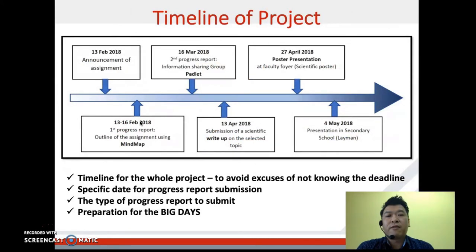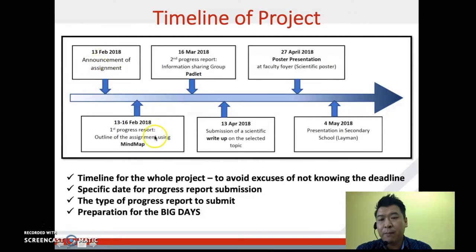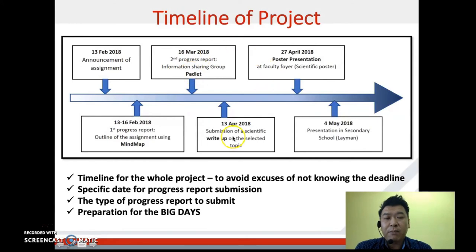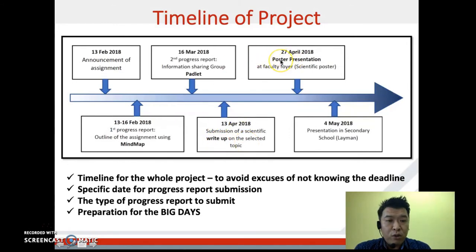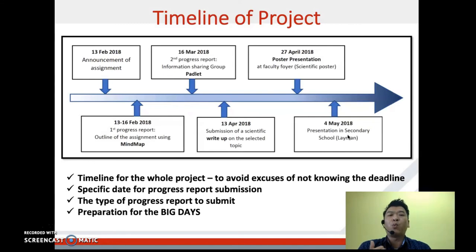One of the most important things for the mini project is the timeline. You have to create a timeline that specifically states the dates students need to meet. For example, the first deadline is for the mind map progress report; the second is to share information found on Padlet; the third is to submit a scientific write-up on the selected topic; the fourth is the poster presentation at the faculty; and lastly, the project is brought to the school. Having this timeline in place gives students clear deadlines for what is expected of them.